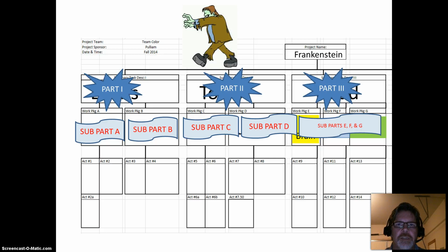The idea is that we can name anything within our work breakdown structure any title, whether it be a summary task, a part, or a work package as a subpart. You can call it whatever you want. It's just important to know that the component parts underneath a particular part make up the composition of the part above it. As you see in the organizational chart, the decomposition means those sub-tier parts support the above tier parts, and when combined they make up that part.